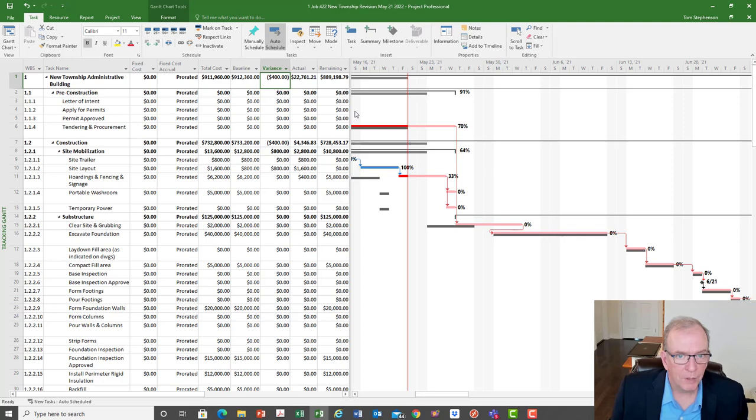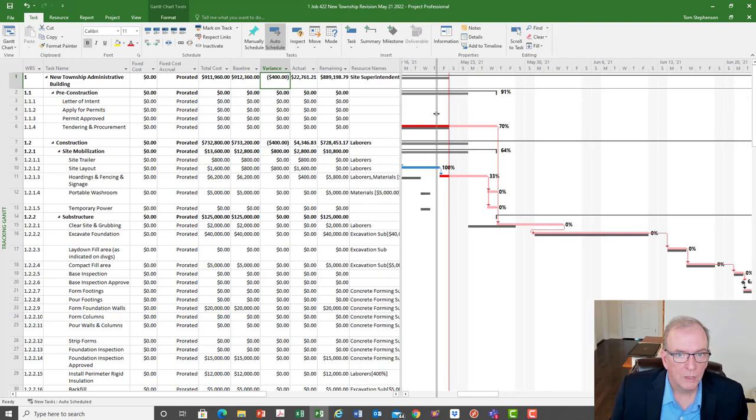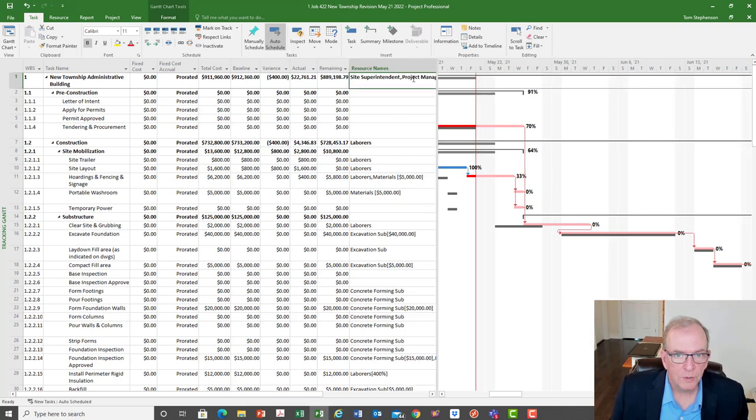By doing this, double clicking on that link line, I put the -3 days, right? That saved me $400. You might be wondering, well, how could that have saved you $400? Well, it means that I had the site super and project manager assigned to the whole project. And I also had, well, I don't think it's saving me anything there. I had the excavation sub assigned at $40,000.